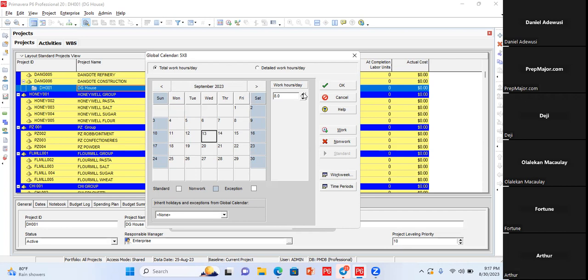change those bank holidays. So we go back to May. Can you go back to May? Let's start from May. Let's select 1st of May, which is a bank holiday. Because we want to change it to non-work hour, it is saying it is a work hour now. What you would do is go to non-work. Click on that. That will change it.